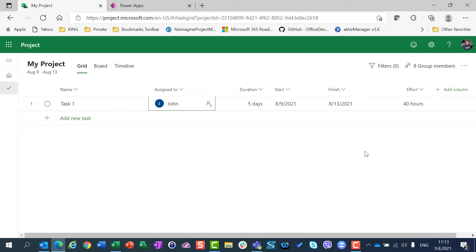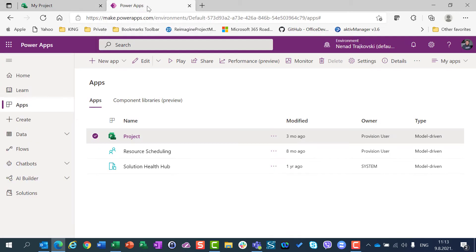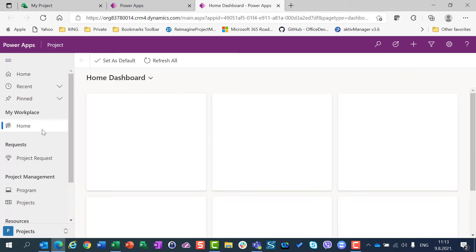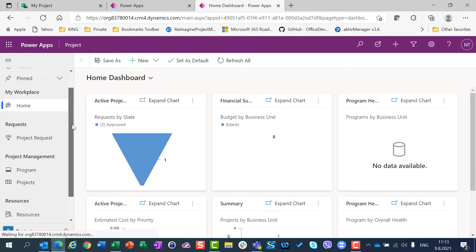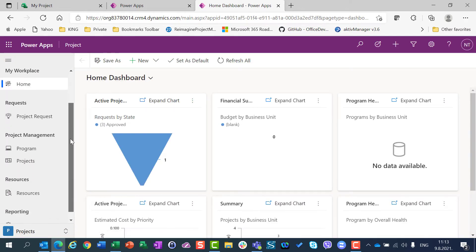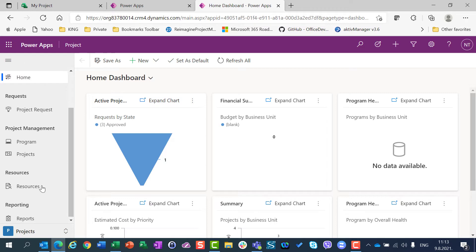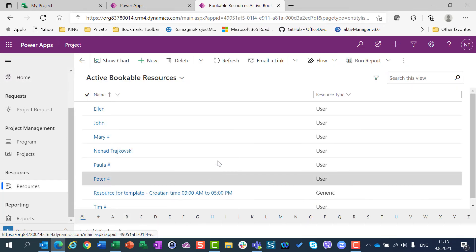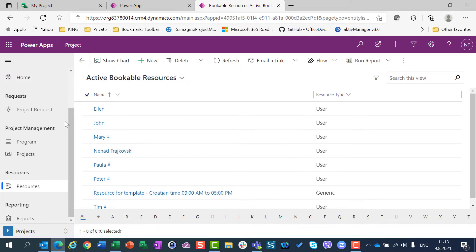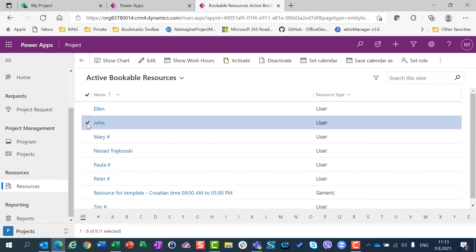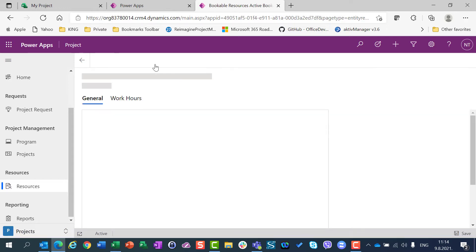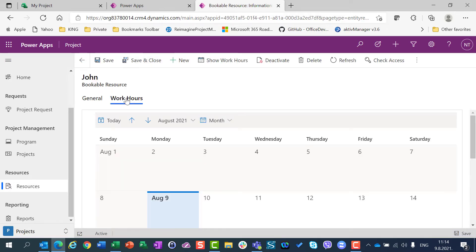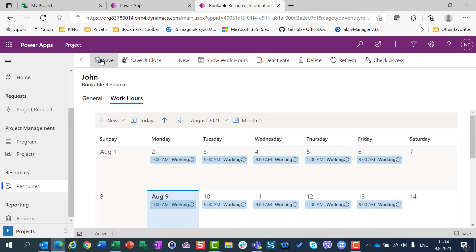But let's say that John should be on his holiday in the middle of the week. How can I do that? I can go in PowerUps, I will go to Apps, I will choose Project, and after I will have this screen, I will scroll a little bit down and I am going to choose Resources. Here, I need to set up non-working type for John, so I am going to choose John, Edit, Work Hours.